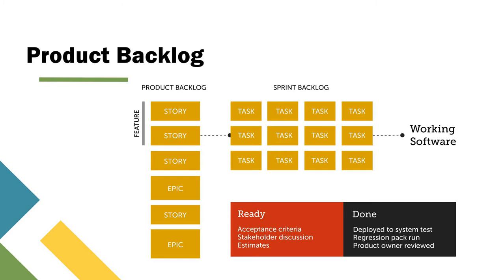This is an ongoing process performed by the product owner and the team. The Scrum team decides how and when refinement is to be done. The product backlog items are primarily updated by the product owner. The higher ordered product backlog items are usually clearer and more detailed than lower ordered ones.